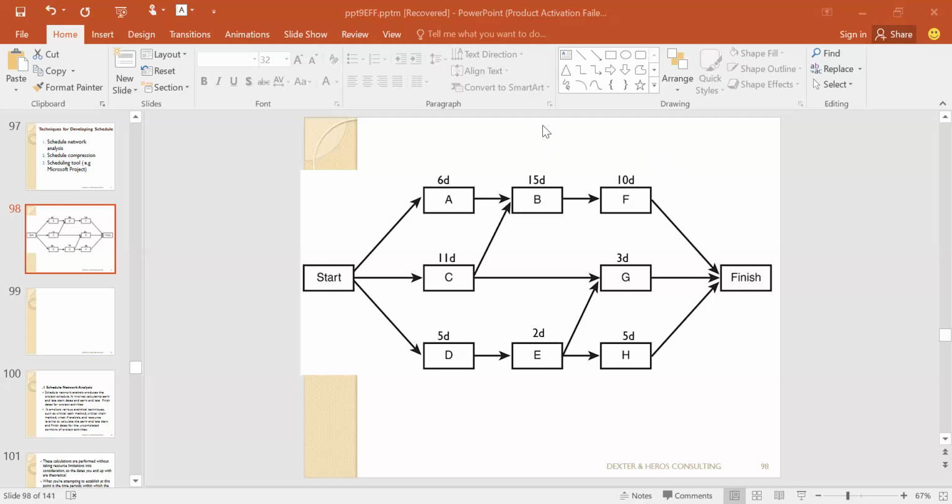Is it easy to find out in your own project? Is it very simple to apply to your own project? Once you know the activities and their durations and you sequence the activities, you can know your critical activity. That's all. How? Just find which of the parts in the network that you're sequencing is the highest in number. That's all.